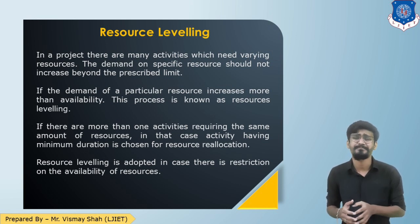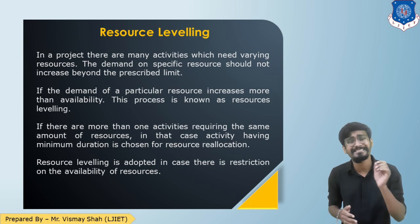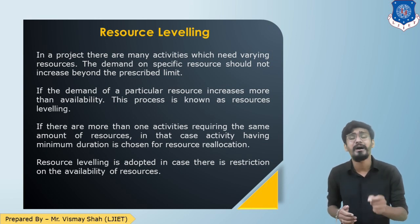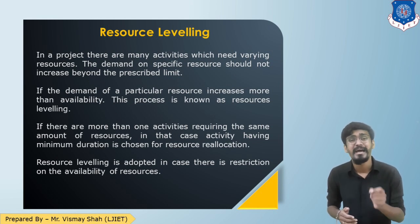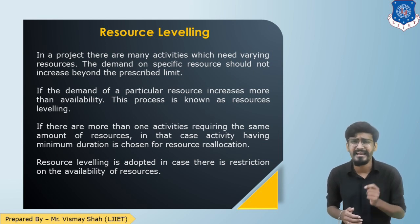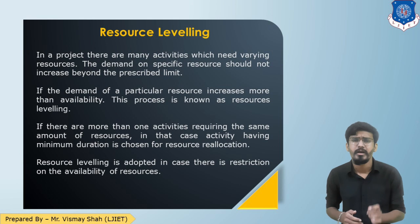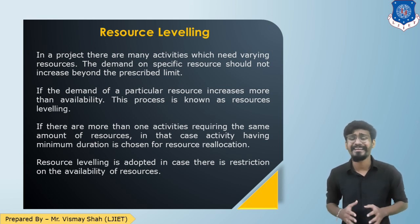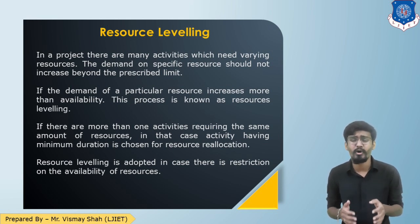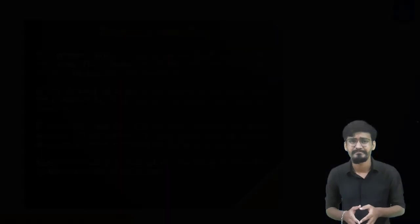If there are more than one activity which requires the same resource to perform the activity, then the activity which has the minimum resource requirement has been selected for resource reallocation. So resource leveling is adopted when there is a restriction on the availability of the resources.